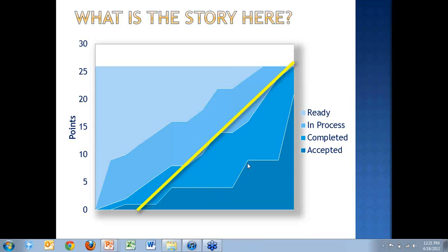They're cruising right along with the expected timeline. But what you see here is missing product owner, boom. They accepted a bunch of stories. Missing product owner, the product owner hasn't even been around. They didn't accept any stories until, boom, all of a sudden it jumps up here. Missing product owner, boom.